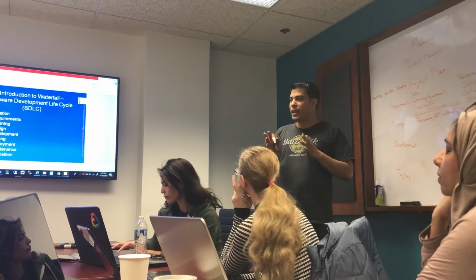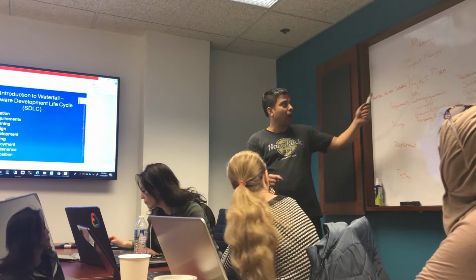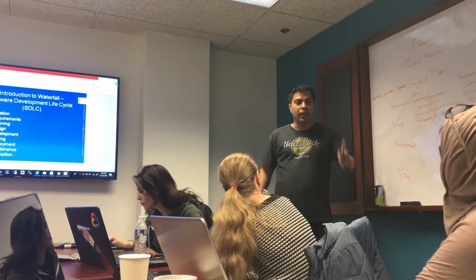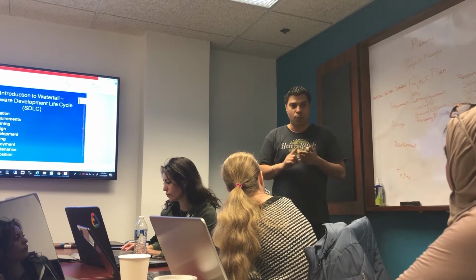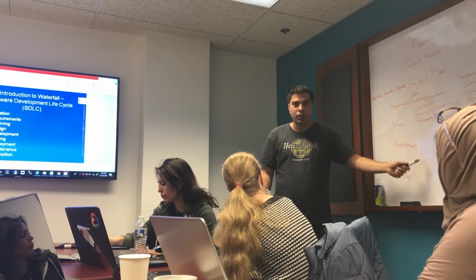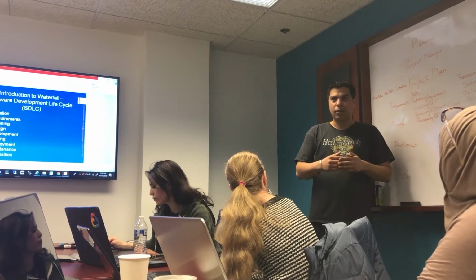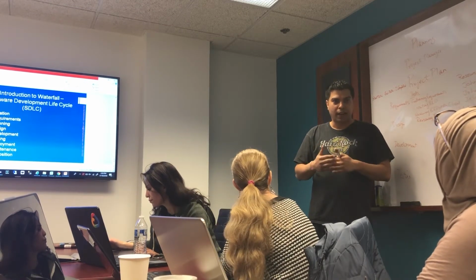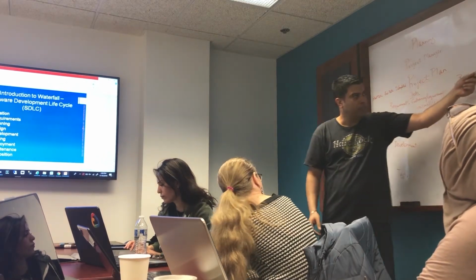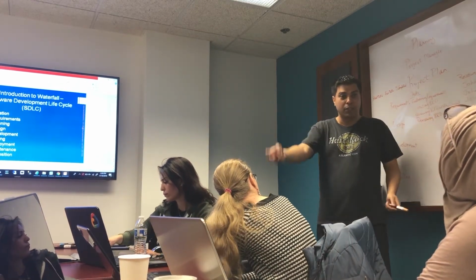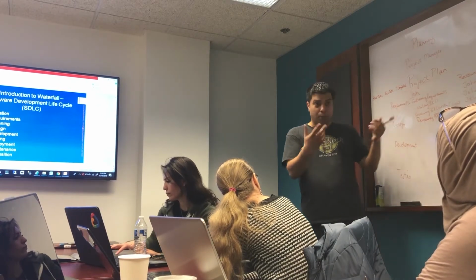Yes, this is the best estimate based on our discussions. What did I tell you? After the planning phase, we will tell you the exact timeline and the exact amount. How does he come up with the cost? They know the salaries of each employee, if it's a full-time employee or a contractor, hourly rate. So this is the timeline, plus 3 months buffer, okay? Could be 4 months depending on the project.